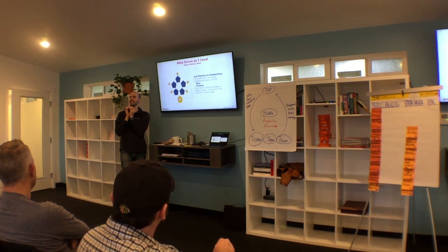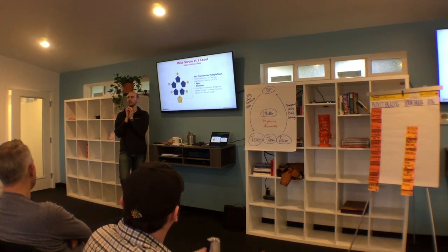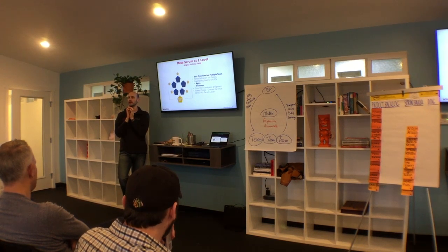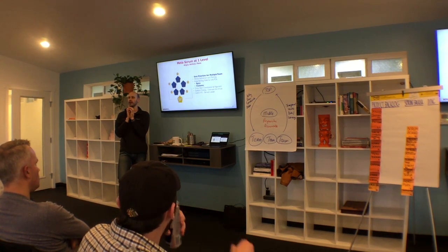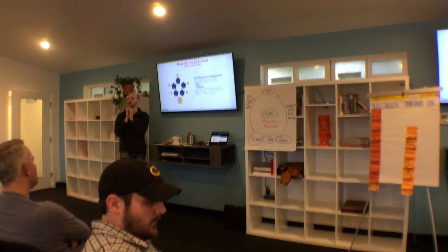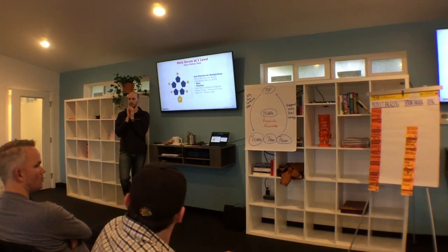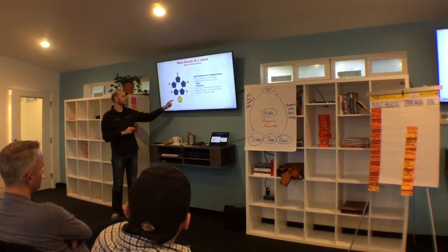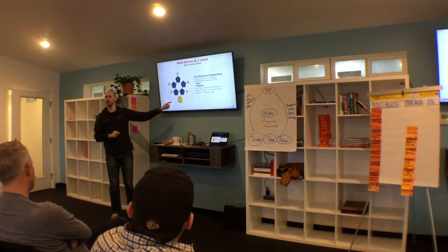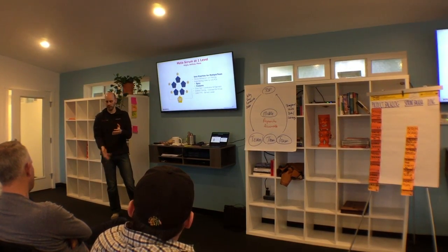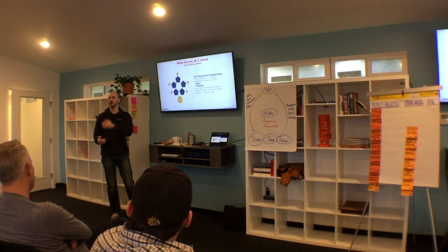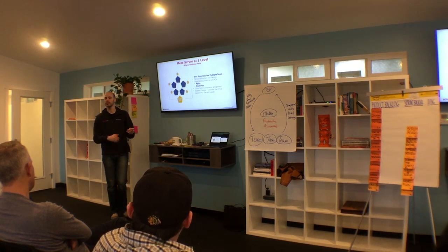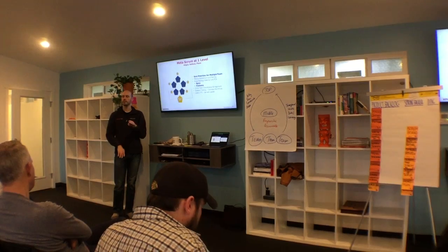These product owners meet twice. In which meeting in Scrum does the team look at the big chunks of the backlog, re-estimate them, and split big chunks into smaller chunks? Refinement. Yep. So these product owners meet in what's called meta-Scrum refinement. They look at their parent backlog and they refine it. And they invite subject matter experts, often their team members, and they do this every sprint. And they refine the parent backlog.